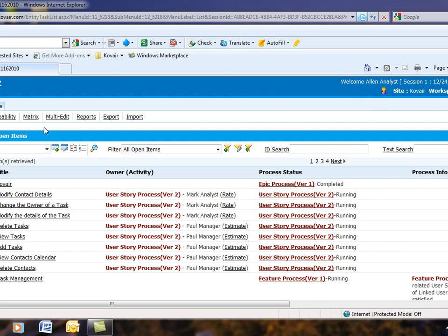The epic is at the top, which is a very high level requirement given by the customer, which has been decomposed into further features underneath, and each of the features are further broken down into a number of user stories.